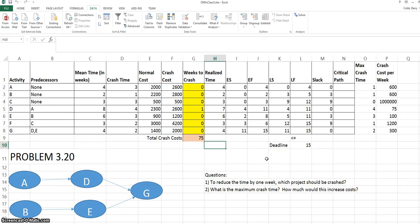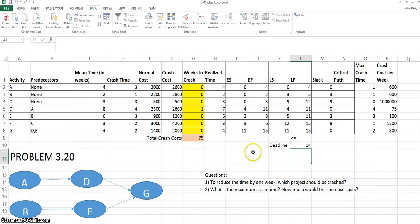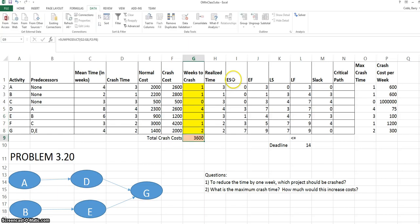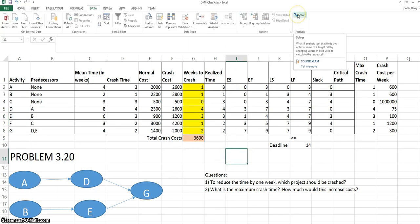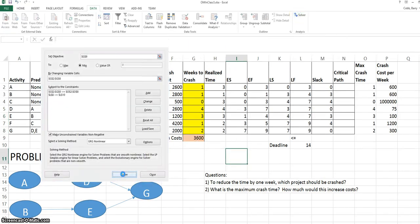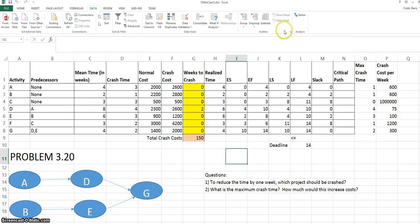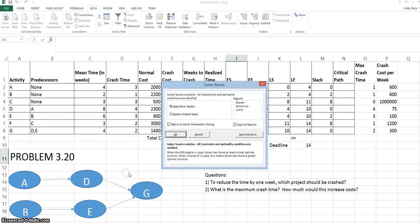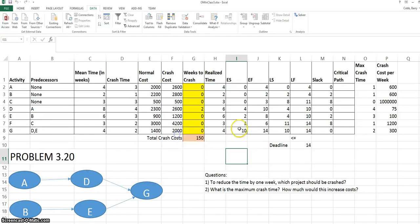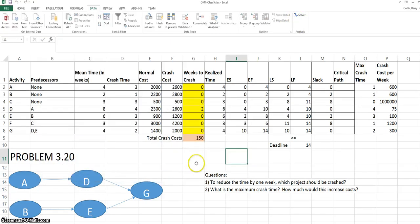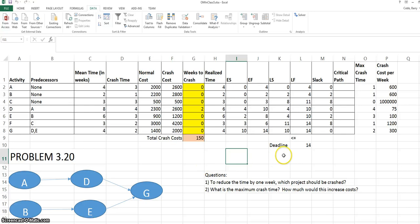Another part of the question asks us what is the maximum crash time. The best way to answer this would be to change the deadline by one day at a time and each time go back to the original starting values. Click Solve two to three times just to make sure we've settled on the correct solution. Now we see we want to crash activity D by two weeks. This is not surprising because it's the cheapest activity to crash. Now in a moment I'm going to pause the recording and keep going down by one week so you can do the same.